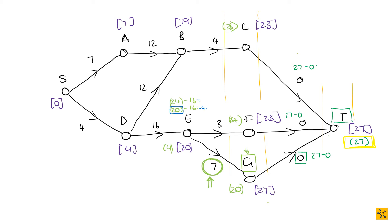Just a reminder: when you're working out these calculations, you look at all the arcs radiating out of that vertex, you look at their latest start times, you take the smallest of those, and then you subtract the weight of the edge radiating in towards that vertex. So let's move on and go to B. B is 23 minus 12, which gets us 11. So B's latest start time is 11.